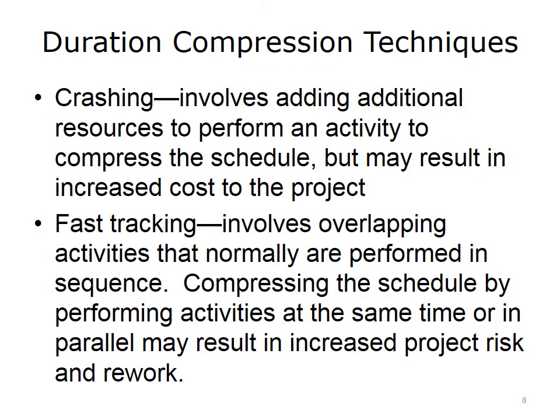The project team attempts to create a realistic schedule. The project team will examine alternative approaches to get the project schedule back on track with the schedule baseline if the schedule exceeds the duration required to complete the project. Two project schedule compression techniques are crashing and fast tracking.